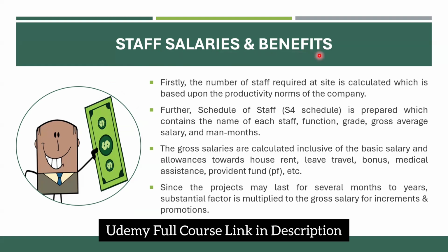All the staff present at your site, from execution to planning to the project manager, construction manager, safety in-charges, quality in-charges, and so on, everyone will be considered under the component of staff salaries and benefits. Whatever their salaries are for the entire project duration, and whatever benefits, perks and allowances they get along with the salary, will be contributed to this particular item.